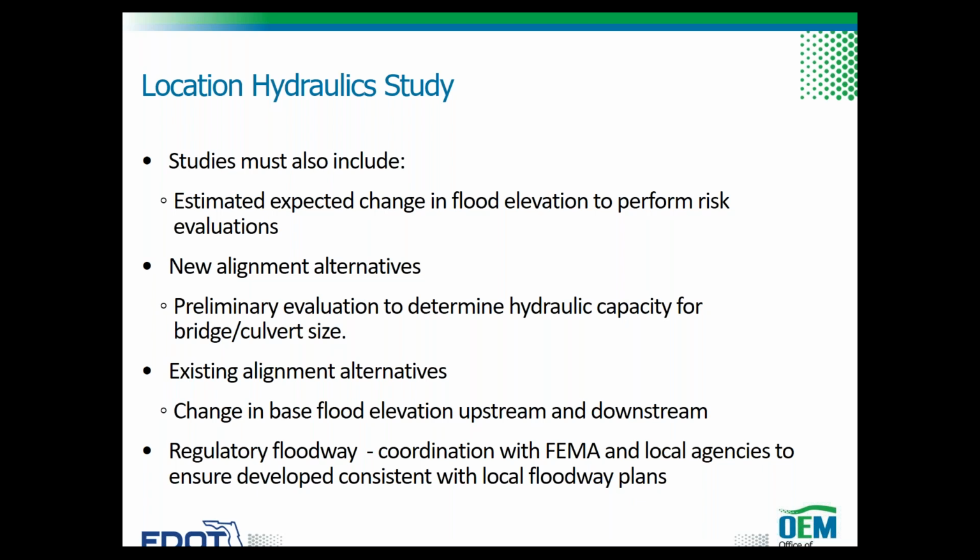Whenever it is determined that a project will involve a regulatory floodway, the district drainage engineer or designee must coordinate with local agencies and FEMA to ensure the project will be developed consistent with local floodplain plans and floodplain management programs. This coordination effort and all associated drainage work must be documented in the location hydraulics report and summarized in the environmental document.